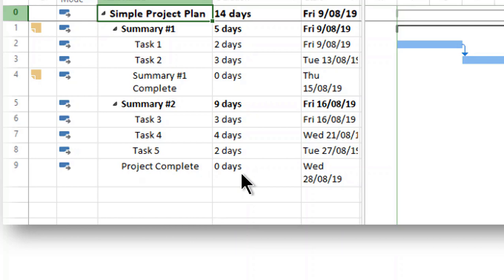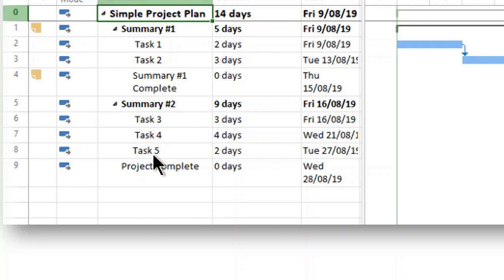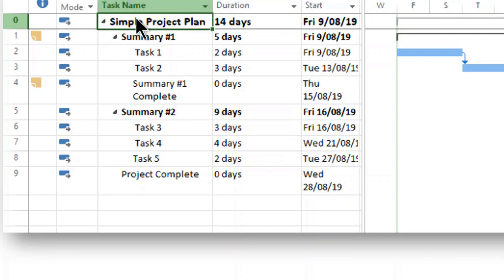Of course tasks can be broken down into subtasks. This is our main task. These are subtasks. Another best practice is project itself should be a large summary task that can be added automatically. So this is called project summary task.